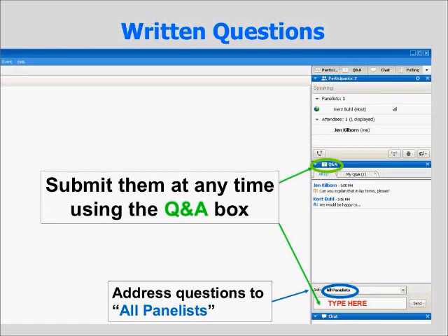I would speak to my local field environmental officer. If you're asking me, what's the strict correct answer, it's that any roadway within 1,000 feet, you do the noise analysis, and then you do a barrier analysis.